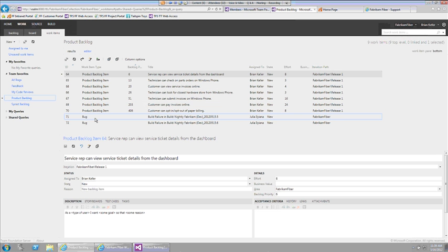Where you will go through the product backlog and add new items if need be. So, for instance, let's say that the product owner just realized that we need to create a new feature that was not included. Then the product owner, who really owns the product backlog, will create a new item, and then this item will be added to the backlog and prioritized. Those are the two things you have to do prior to the sprint planning meeting. You have to have a product backlog, and it has to be ordered by the product owner as an input. Now, product backlog items are work items.